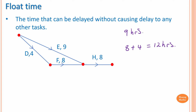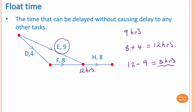So the earliest time to start activity H is 12 hours. Activity E completes in nine hours, so 12 minus nine equals three hours. Therefore, activity E has three hours spare, meaning the float time for activity E is three hours.